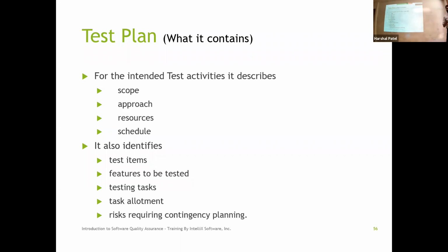What can you do? And they say, hey, what if we delay this feature? So instead of giving a Pro Max camera, we'll just still give that, but we'll update the software later on to add additional features. Is that acceptable? Right? That's a risk claim. Hey, I don't have to test that feature, so my testing time goes down. Right? So now I can accommodate hardware being delayed by 4 weeks to deal with that. Okay.